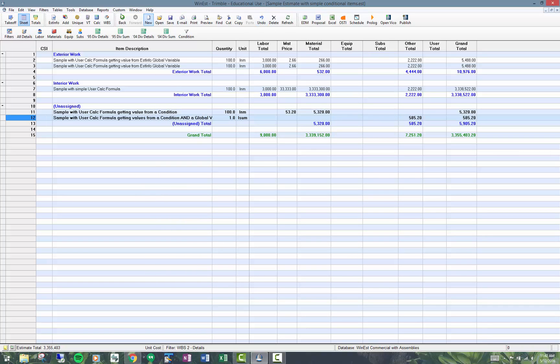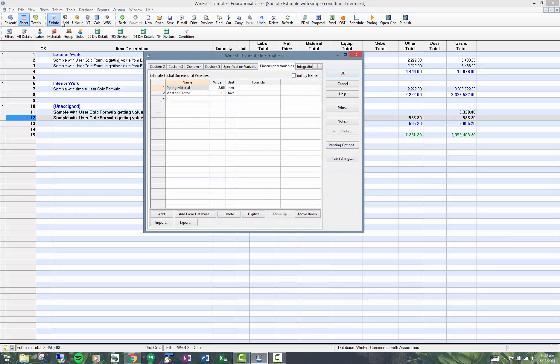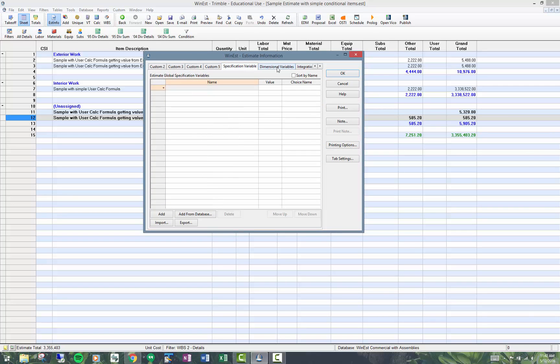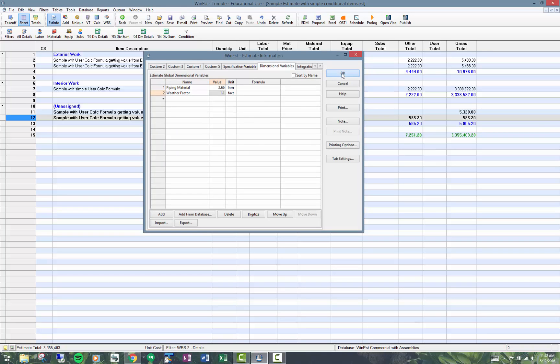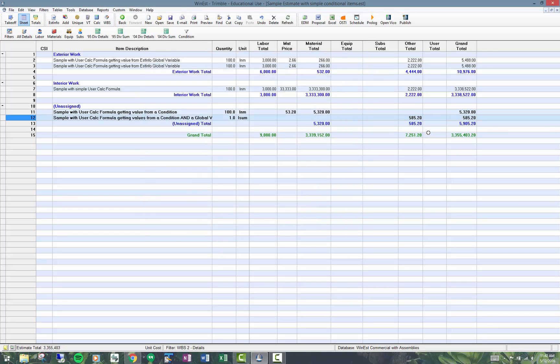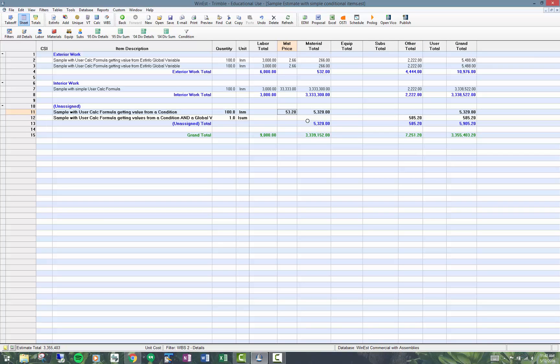Just to show you where this is coming from, global dimensional variables are stored up here under specification or dimensional variables. You can see I'm getting a factor of 1.1 here. I'm setting the other unit price right here, $585, which is 1.1 times $532. It's 1.1 times the value.